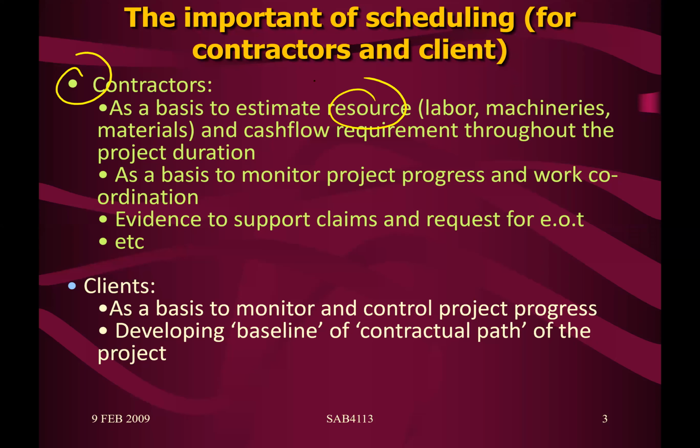Okay, for contractors, again, basis to estimate resources. Based on how much of the work needs to be completed or activities, then basically you will know the quantity of the work, how many resources you want to use, and how much money you need to spend to execute certain works. So that's why it is a basis. Otherwise, without planning, you cannot quantify how many manpower you need, how much money you need to spend, how many machinery, and when machinery needs to be called in. You do not want to bring machinery too early, too late, or only a few, whereas you need a lot more, and etc. So that is something to do with planning.